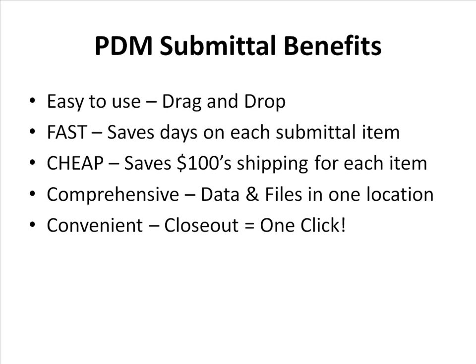The final thing, and probably one of the most important things from the owner standpoint, is that the PDM submittal processing allows for a very efficient and a very complete closeout. All the documents are stored electronically, so at the end of the project, the construction manager can simply select the project, select the documents they want to close out, press a button, and transfer all of the files that have been collected during the entire project onto a CD, a hard drive, or transfer them electronically to the owner's facilities management system.